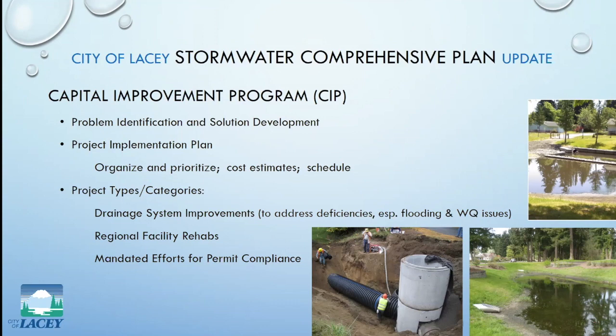We work up initial cost estimates, which are also in the appendices to the plan. And then there's a prioritization process where you take into account factors such as urgency and the benefits, efficiency, which would include coordinating with other projects when that's possible. So there's a lot that goes into it. And that process is explained in the appendices. I think it's Appendix D has that.